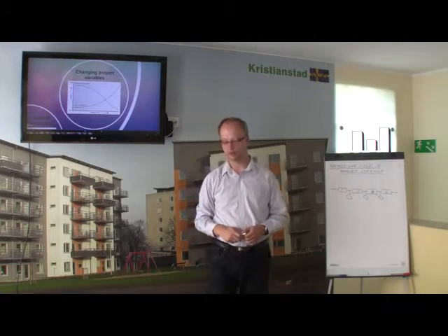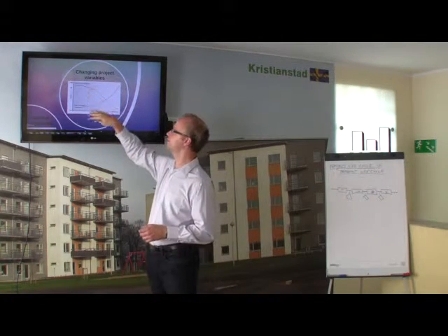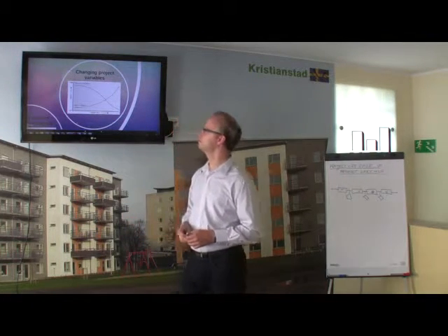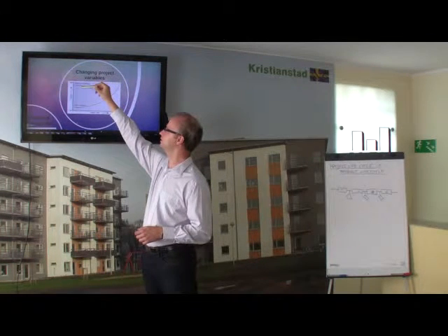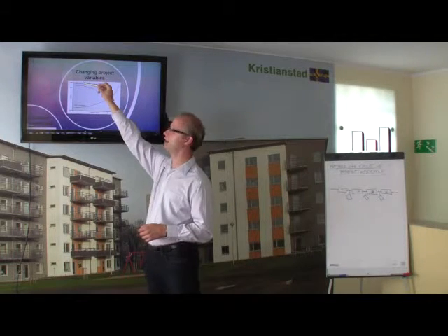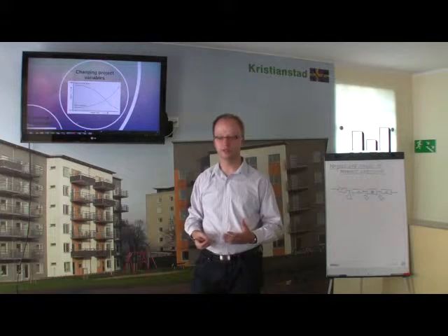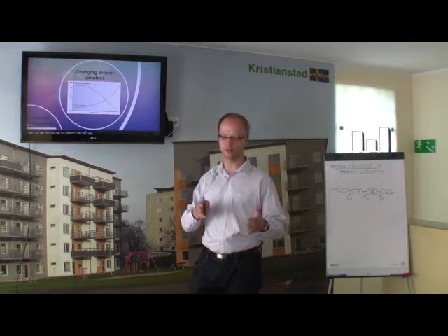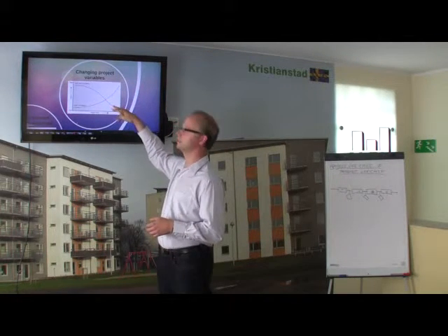Project variables over time is a completely different story. As you can see here, we have risk and cost of changes variables, and the risk variable behaves differently than the cost of change, because we have high risk in the beginning. This is caused by a lot of uncertainty at the beginning of the project. We need to define products well, and we need to plan the project. Then in the execution, the risk is getting lower and lower.